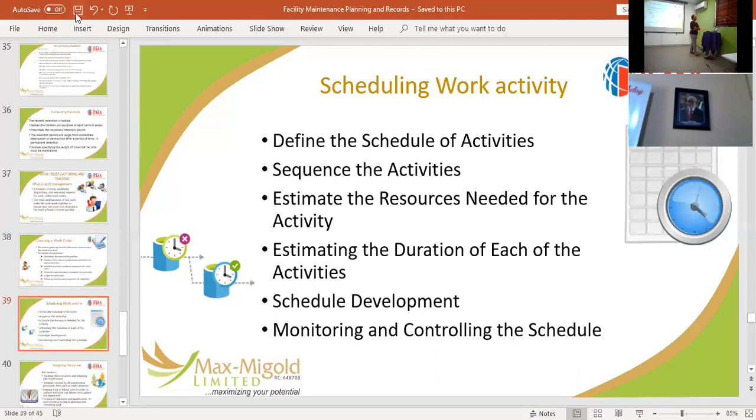Good. I've seen from experience that every time I try to execute jobs on Monday, there's a problem, because when I need to follow up, it's not on Sunday that you're calling people to remind them we have this job tomorrow. Your contractor is coming from far away and you're expecting him to work on Monday. You will not spend 5 hours on something like that. So I will advise Tuesday, Wednesday, Thursday. Better.